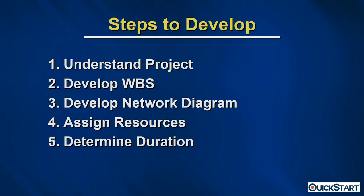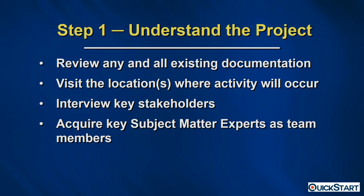There are steps you need to go through to develop CPM. Step one: understand your project. Step two: develop a WBS — a Work Breakdown Structure. Step three: develop a network diagram. Once that network diagram is in place, step four: assign resources. Step five: determine duration. Those are the steps to develop a CPM schedule.